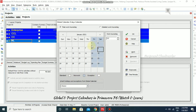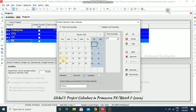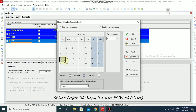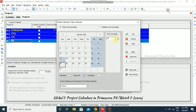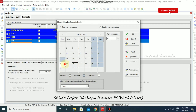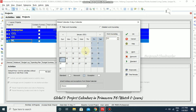You can also set exceptions. For example, if you want to mark the 17th as a holiday, click on that date and set it to non-work — it will appear in blue. For the 24th, you can set it as an exception with only four hours of work instead of the usual nine. The calendar will change to a slightly different color to indicate the exception. So the 17th has zero hours as a non-work day, and the 24th has four hours as an exception — this is how you manage standard work, non-work, and exception days.